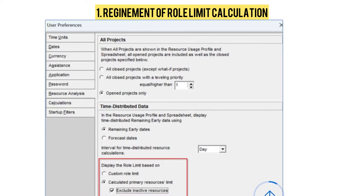The first update: whenever you go into the Primavera P6 Edit option, you will find User Preferences. In User Preferences, they have added the refinement of role limit calculation. If you choose to display the role limit calculated according to the primary resource's limits, you can choose to calculate the limit using only active resources in P6 Professional on the User Preferences Resource Analysis tab.